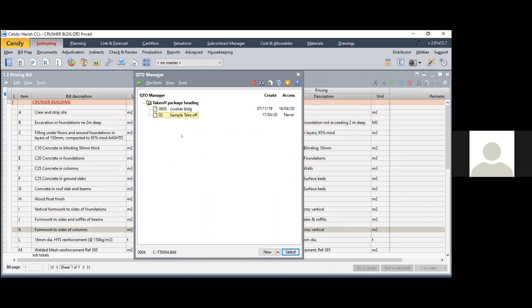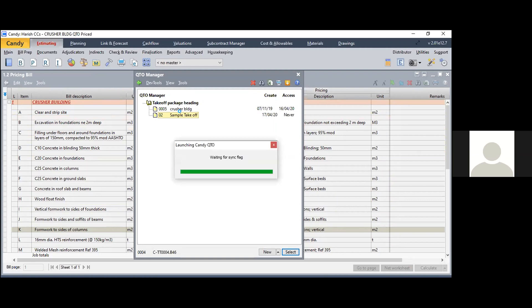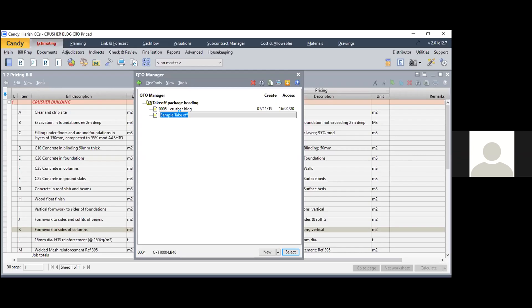You can create any number of packages. Once done, just double-click and Candy will take you to a byproduct called QTO — Quantity Takeoff. This is an additional product developed by CCS itself, which takes part in the drawings and takes off quantities from them. Students, this is the same measurement and quantity calculation you were doing on paper — the same can be done in this plugin.